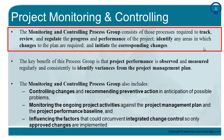For example, the project might be behind schedule — that could be an observation out of the monitoring and controlling process. In order to bring the project back on schedule, you will have to take some corrective actions. Those corrective actions may suggest changes to the staffing management plan, where you decide to put more resources on the project in order to catch up with the lost schedule. However, putting more resources will mean incurring more cost to the project, so there will also be changes to the cost management plan.